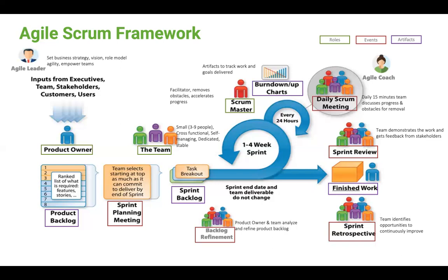All right? So what do we do at the sprint planning? The entire team plans on what they have to do, as well as the Scrum Master is in charge of the capacity, what their team have to decide, what they have to commit themselves, how many stories they have to take into the sprint. The team is not the one to determine that. The developers, sorry. No, the Scrum Master should know the capacity of his team.